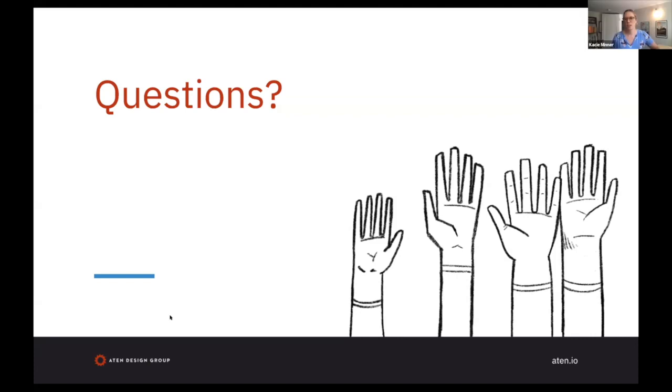The only other thing I was going to quickly add, sorry, Janice, was that part of that backlog building exercise is you will visually see each line that it takes, each task that we have to get to launch, but we also have to remember to factor in QA time and accessibility review time and things like that.